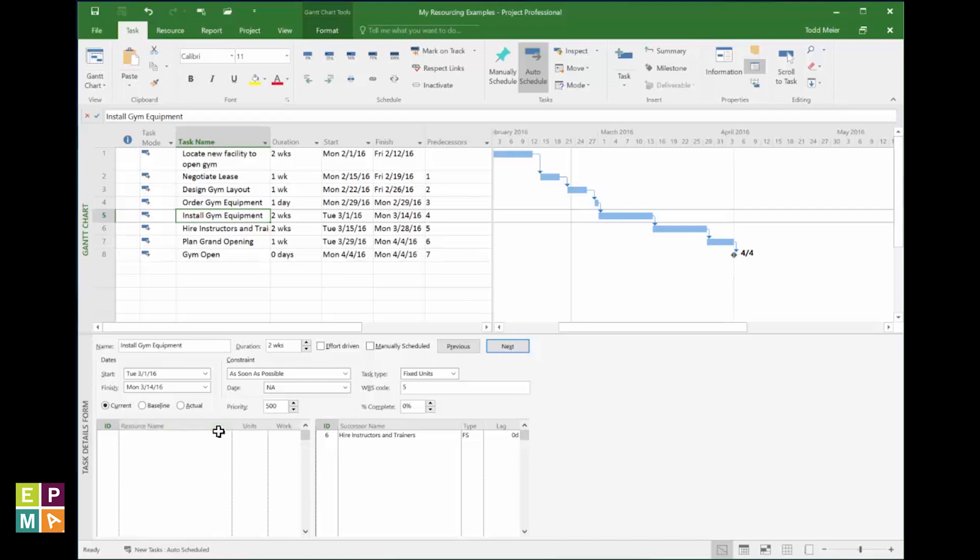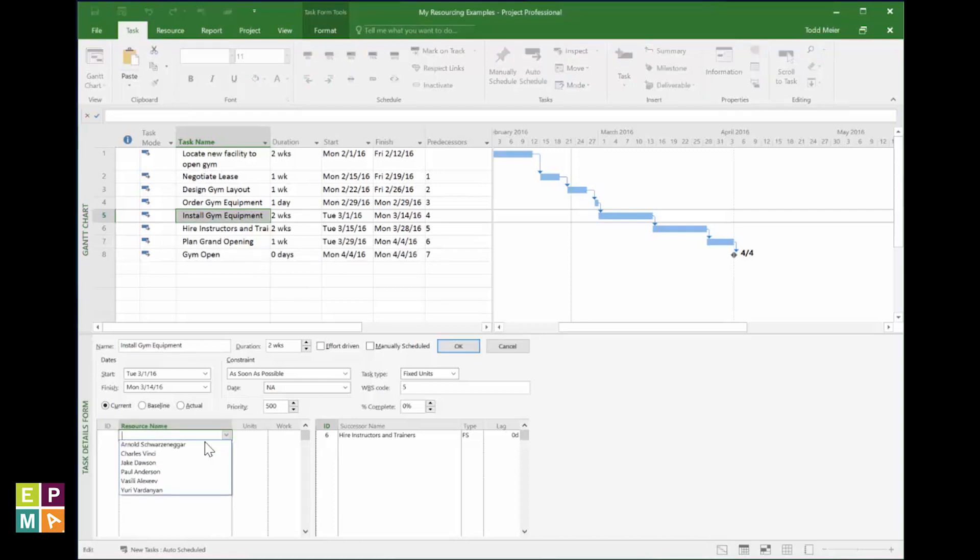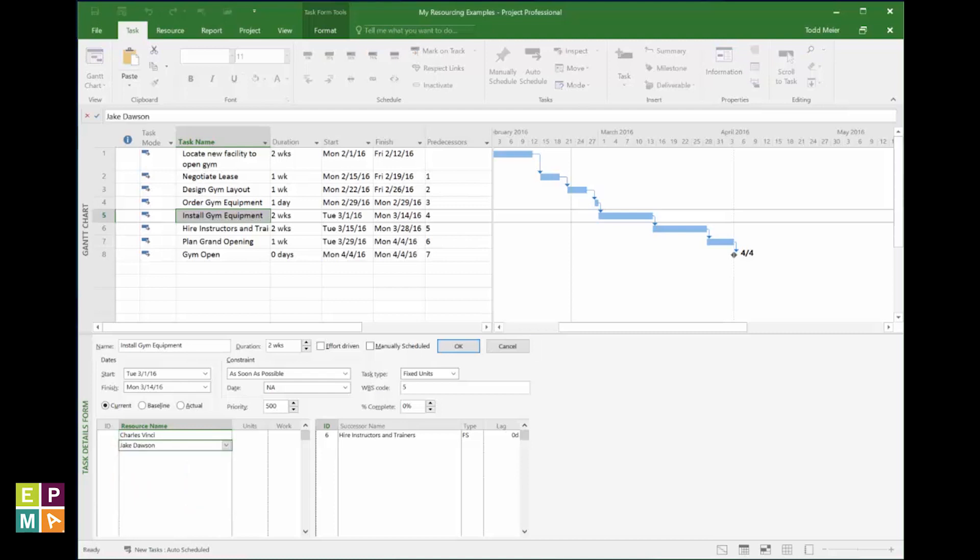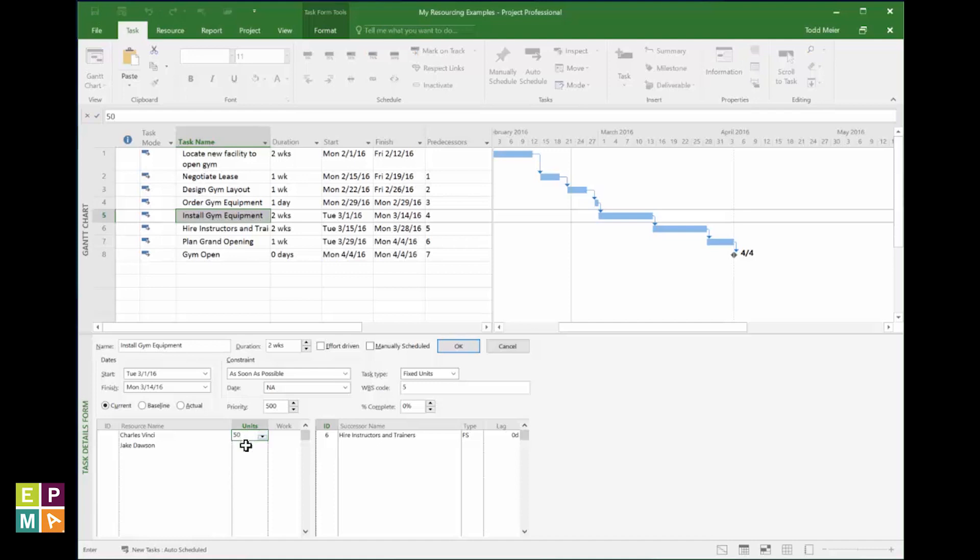Alright, pick your resource from the picklist. Nice! If you think your resource will work full time on this task, put 100 in the units column. If you think your resource should only work half the day on this, and half on something else, put 50. For my task here, I need two guys working on this, and they share the work, so I'll put them at 50% units. Hit OK.